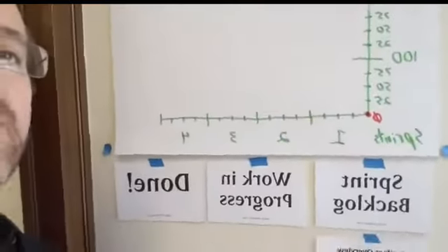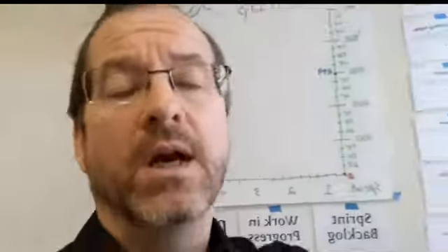We're going to use a burn up and burn down chart to track our progress, so we'll have a good sense of when we might land the core material, and a sense of, gosh, how much of the elective material might we be able to pull in?